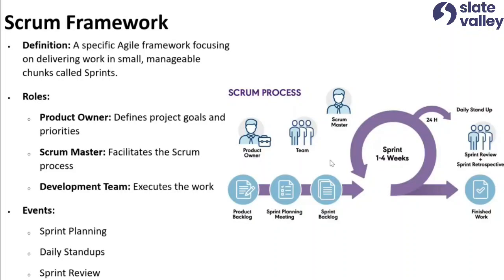When there is a larger team and a larger chunk of things to be delivered, they use 4 weeks. When it's a smaller team, we use only 2 weeks of sprint. A 1-week sprint doesn't happen. Just ignore that part. It's 2 to 4 weeks maximum. So it's a short time and we produce maximum value out of it.